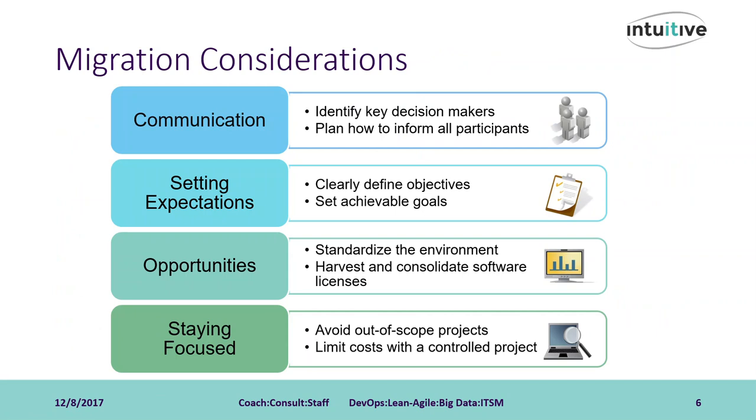Next, set expectations. Clearly define your objectives of the migration. If they change even slightly, be sure to update the team. Set achievable goals. Conduct timeline estimates of your effort involved to migrate one computer, for example, and assign your resources accordingly in your migration schedule. Don't overstretch your migration team or underestimate the efforts involved in the migration. Ensure the end user is aware of their scheduled date and time window for migration of their computer.